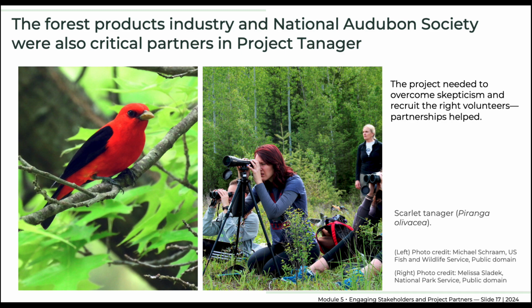Second, the organizers knew that many different sized forest patches occur on private lands. They reached out to the forest products industry for help in locating such lands suitable for the study. This had the dual effect of identifying additional study sites and bringing industry representatives into the project, which was important because some of them were skeptical of its intent, believing that the Lab of Ornithology was out to show negative effects of logging.